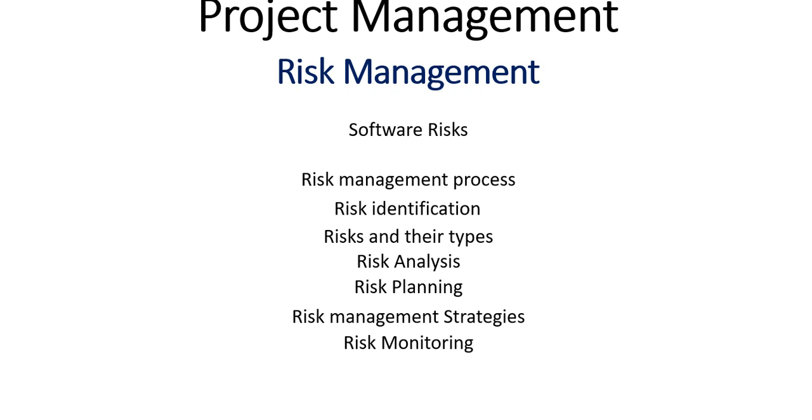Risk monitoring. Assess each identified risk regularly to decide whether or not it is becoming less or more probable. Also assess whether the effects of the risk have changed. Each key risk should be discussed at management progress meetings.